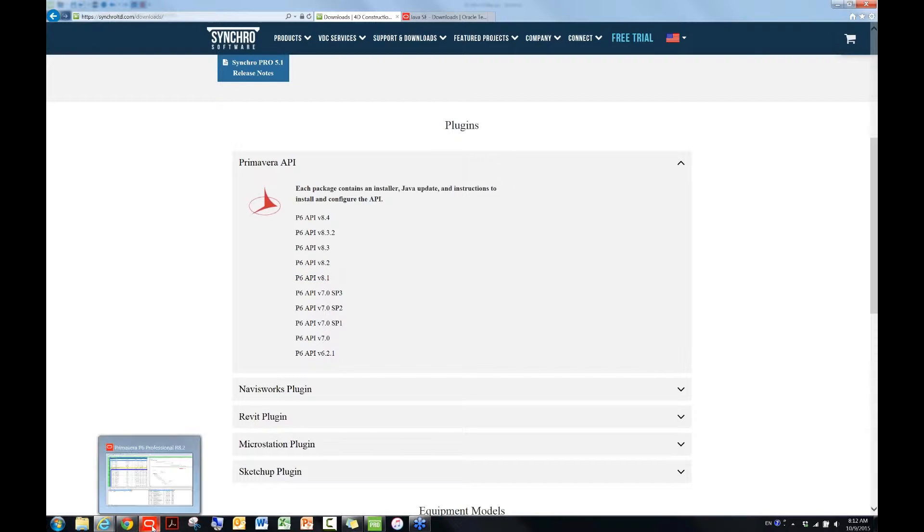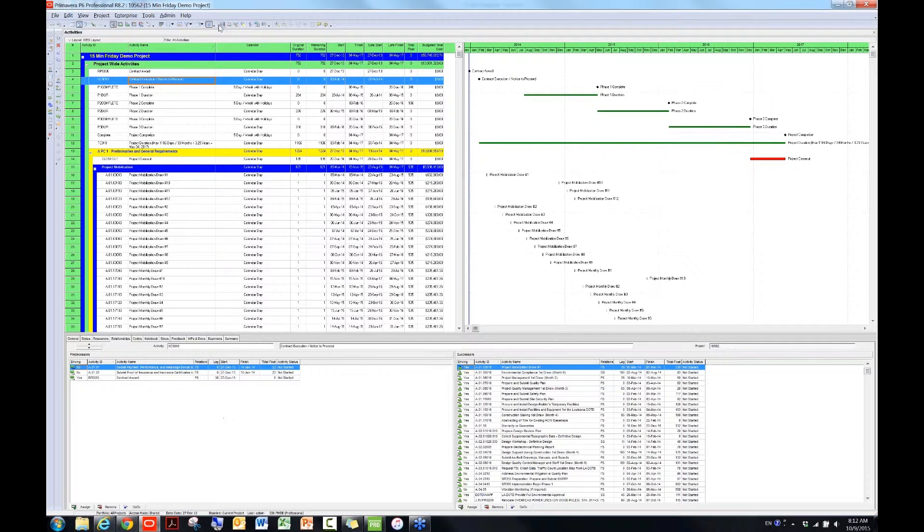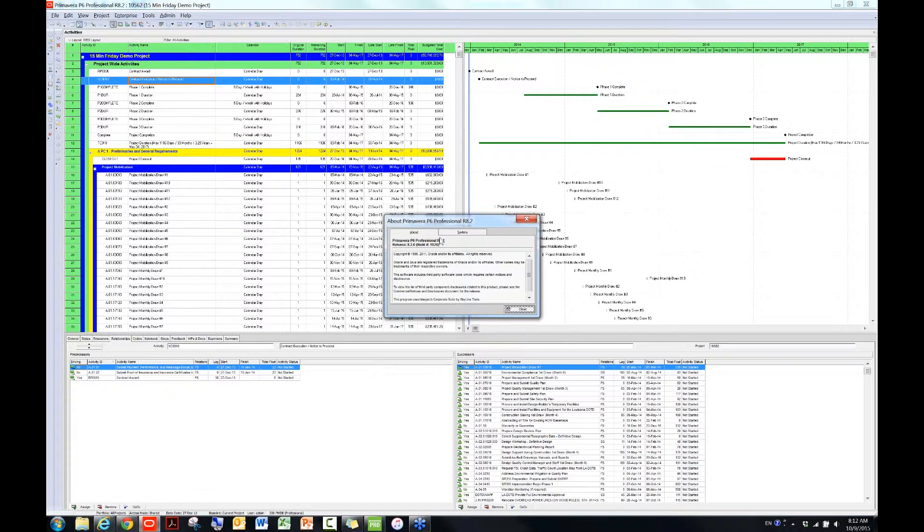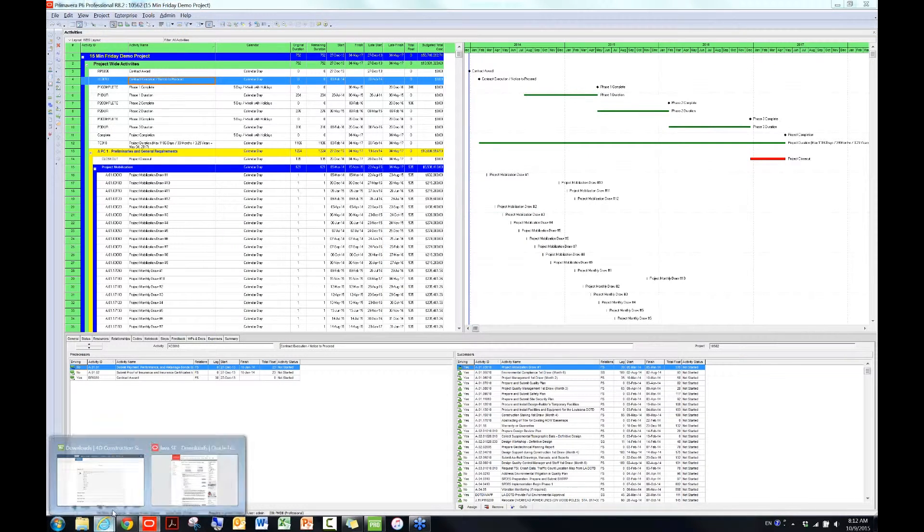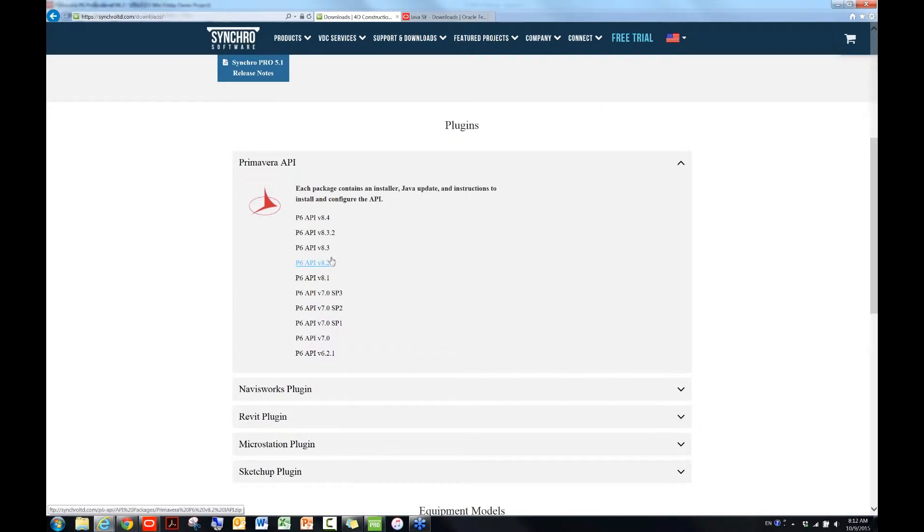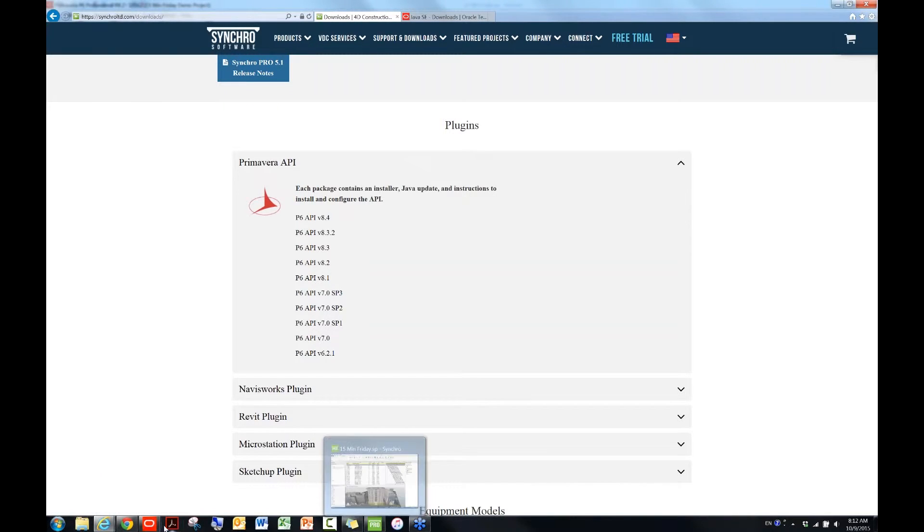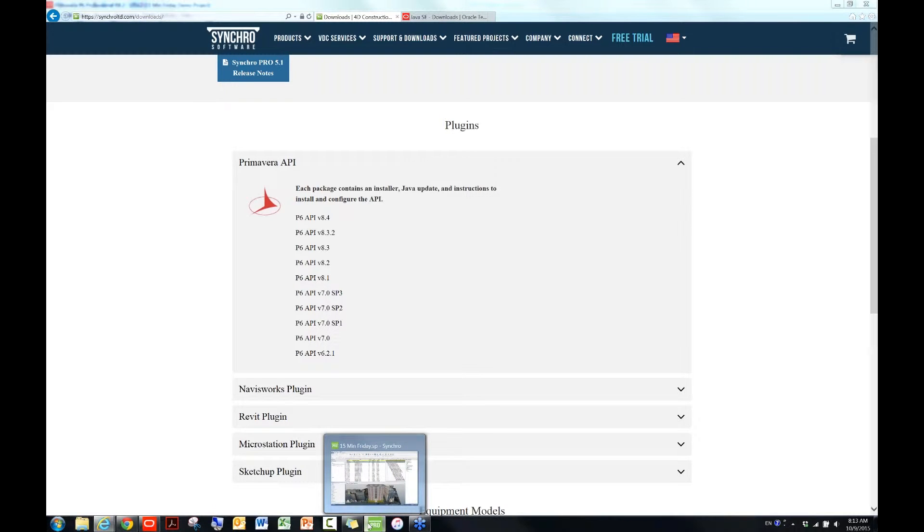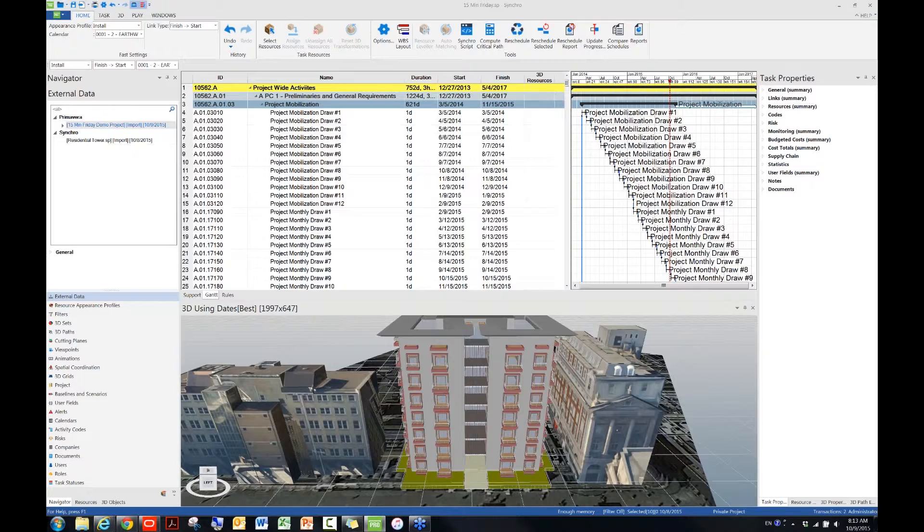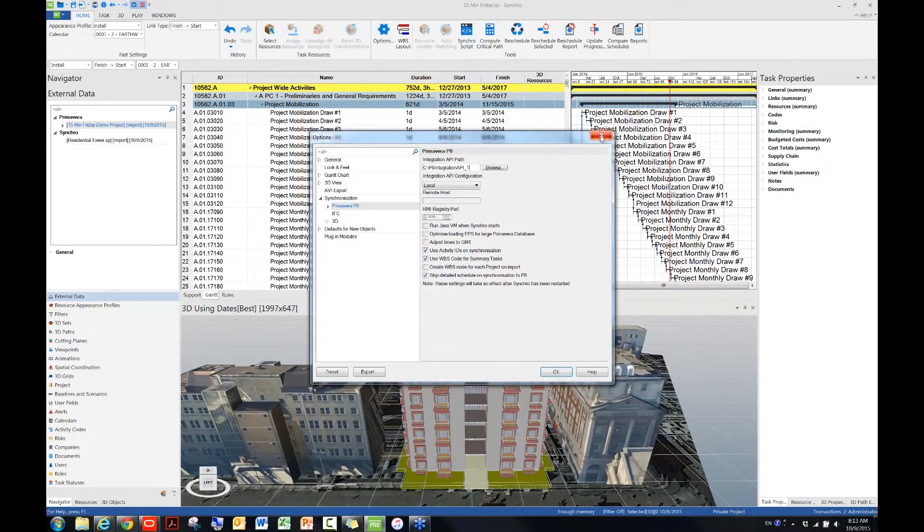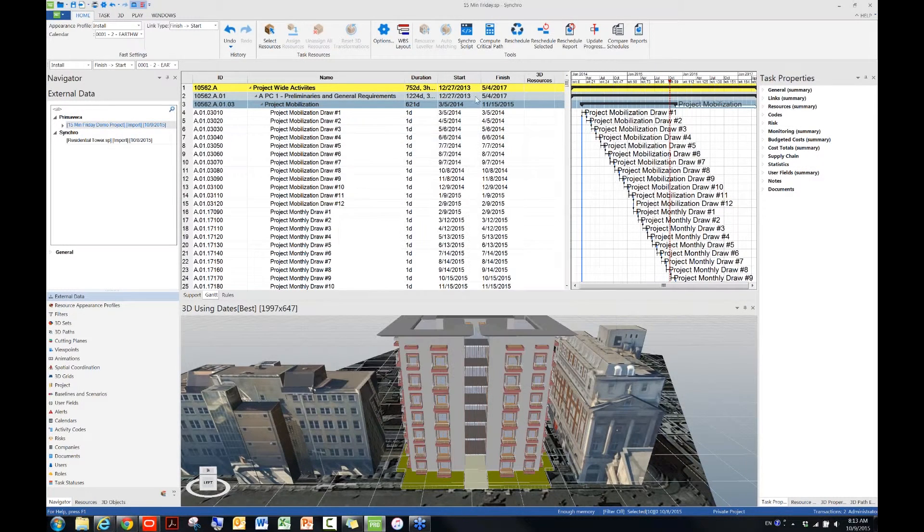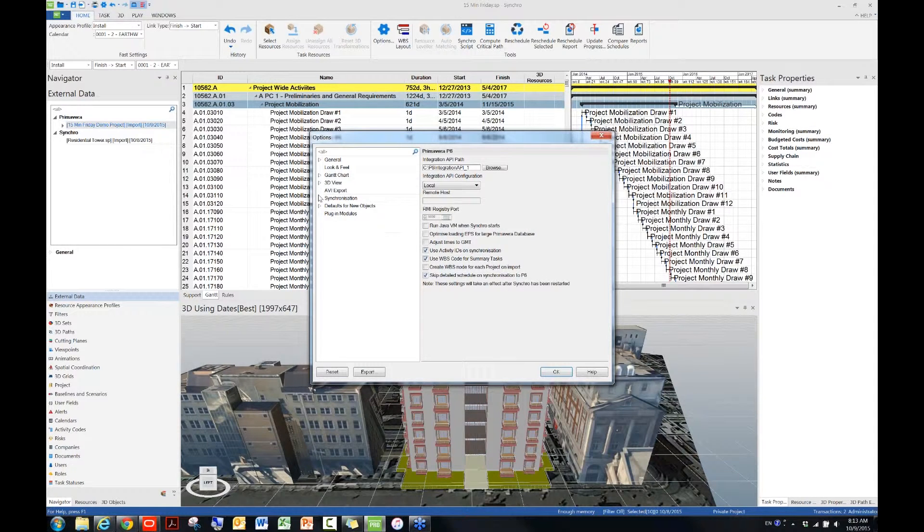Some people may not know how to check P6 version, but it's here. My version says P6 8.2, version 8.2, and then you will need to download the P6 API that matches your P6 version. In my case, will be P6 API version 8.2. And then after you successfully download it to your computer and then install it, you will need to make sure, for your first connection, you will need to make sure that in Synchro, go to Options, and then underneath Synchronization, and then choose P6, you will need to define the API path.